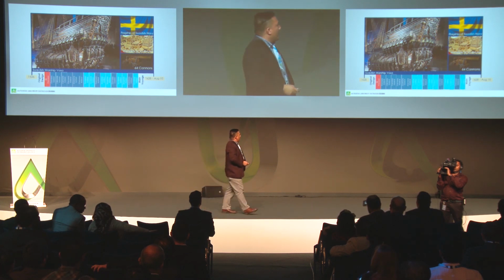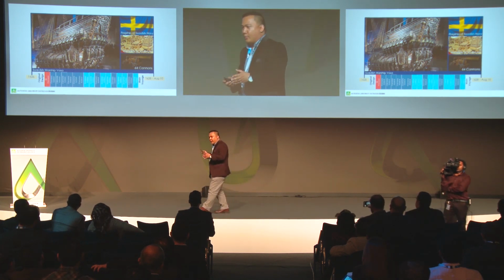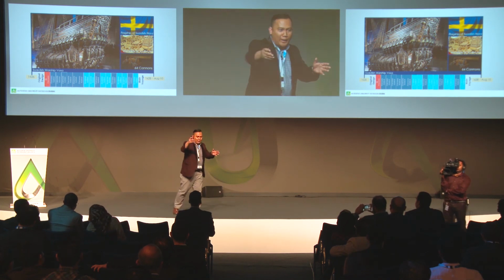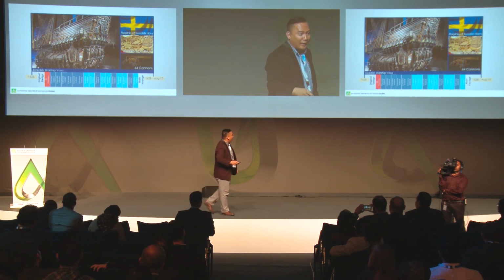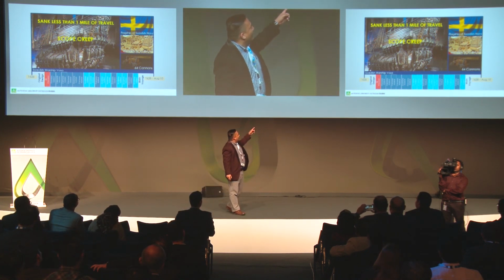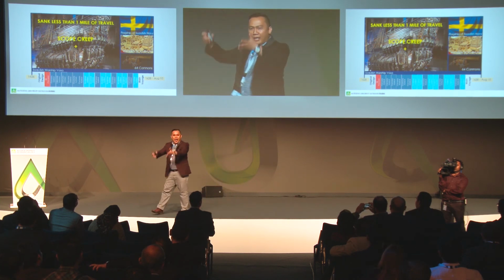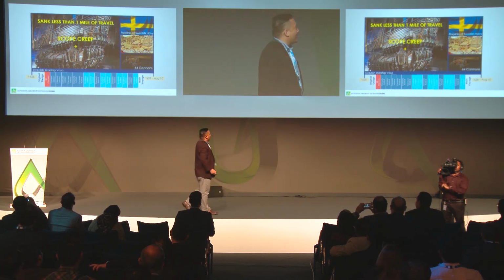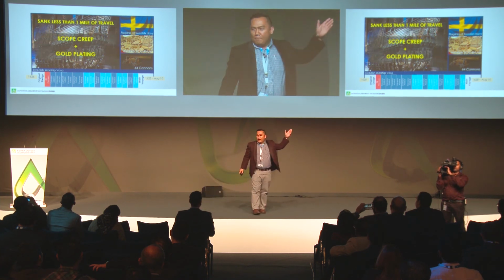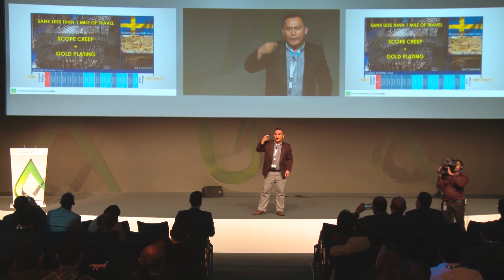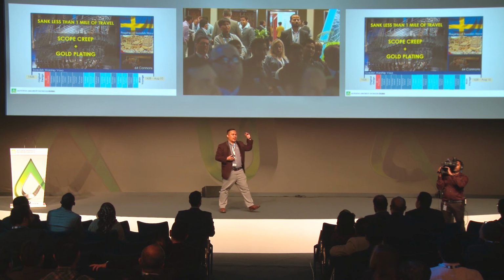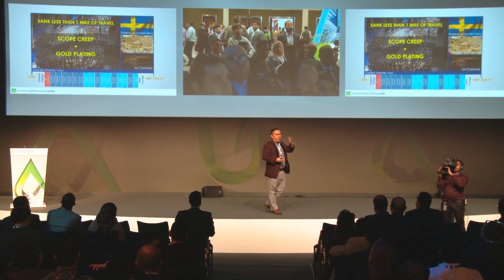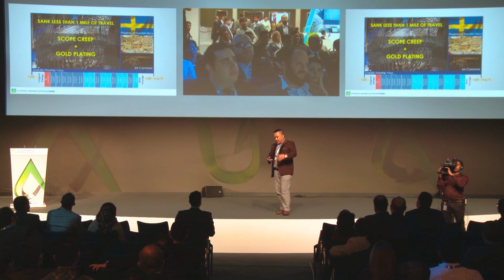So from there, when this Swedish warship began its voyage, after 1 mile of the first voyage, do you know what happened? Sunk. And then literally, scope creep or feature creep sunk the ship. Right? So you have to take this into mind and into consideration. If you have a BIM project, you have to only fulfill the requirements that are stated there. But of course, you can only fulfill those requirements if you have a clear, consistent, and unambiguous BIM specification. Thank you.